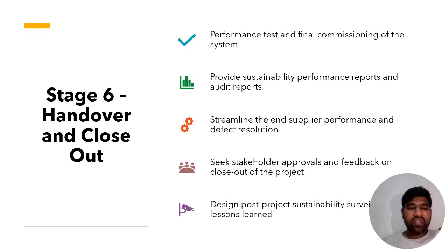In stage 6, handover and close out. This phase involves wrapping up construction and handing over the completed housing units. Final inspections are carried out, all systems, especially sustainability-related ones, are tested, and a performance report is prepared comparing actual outcomes to the original KPIs.